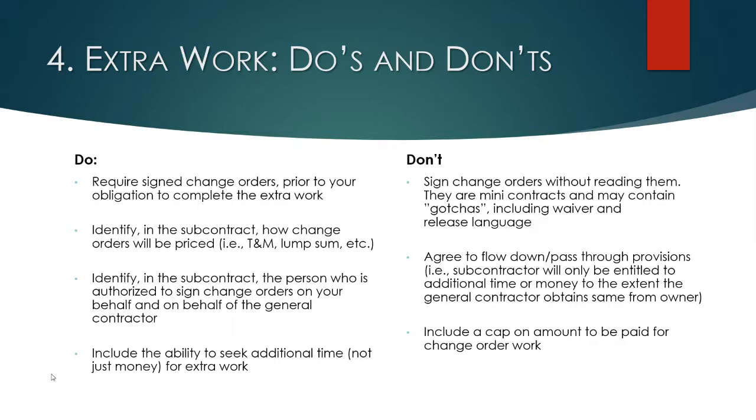Also, don't include any sort of cap on the amount to be paid for change order work. The change order work is going to be what it costs you, plus overhead and profit. So be aware of those types of provisions in your subcontract.